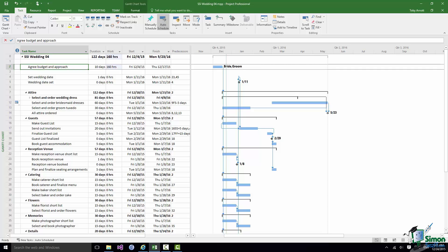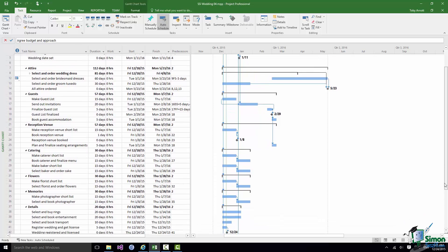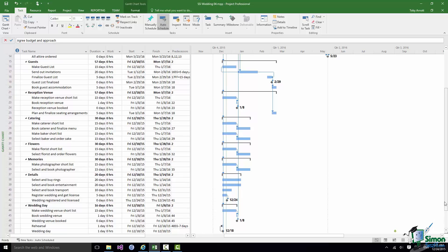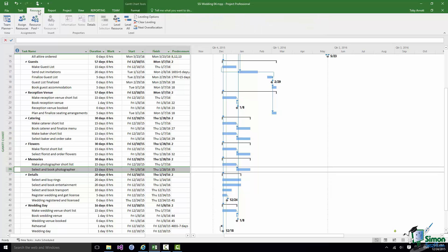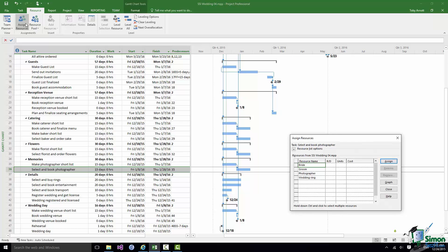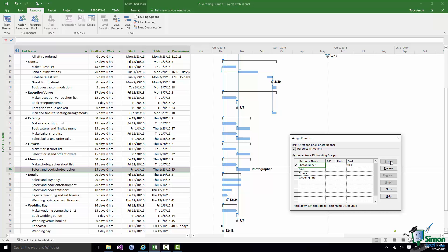Let's go down to the Photography section and suppose that I want to assign the photographer to the Select and Book Photographer task. On the Resource tab one of the buttons is Assign Resources. That brings up the Assign Resources dialog and from here I can assign the photographer. Don't forget that when I assign the photographer we don't have a cost assigned because it's a cost resource and we haven't specified what that cost is until we actually assign it to the task. We're going to allow for the fact that the photographer, videographer is going to charge around about $1,500.